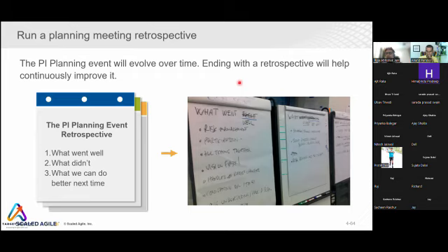If I say that I will do the knowledge transfer, I will work on knowledge management, I will work in more working sessions where each member learns what others are doing, I'm doing risk mitigation. I'm reducing the impact of the risk. The risk will still happen, but it will reduce the impact because other people know what they have to do when one key resource is leaving the company. That is mitigation of risk.